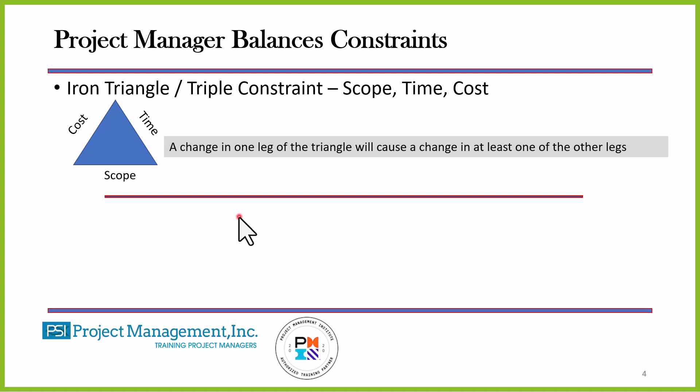Obviously, time is our schedule. A change in one of these legs of the iron triangle or triple constraint will drive a change in one of the other legs, or at least one if not both. So if I change scope, undoubtedly it's going to affect cost, and it probably will affect schedule at the same time.